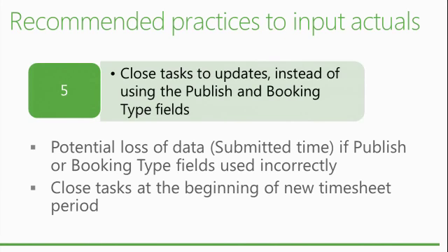Is there any reports of performance issues in the time entry piece of SharePoint? The time entry, no, because it's just regular project. If you use Timesheet, there is no issue, all right? But these rules also apply, by the way, to regular project, where we recommend not to have very long duration for a single task and a lot of resources on each task. Because otherwise, yeah, it's going to generate a lot of rows, it's going to impact the performance.